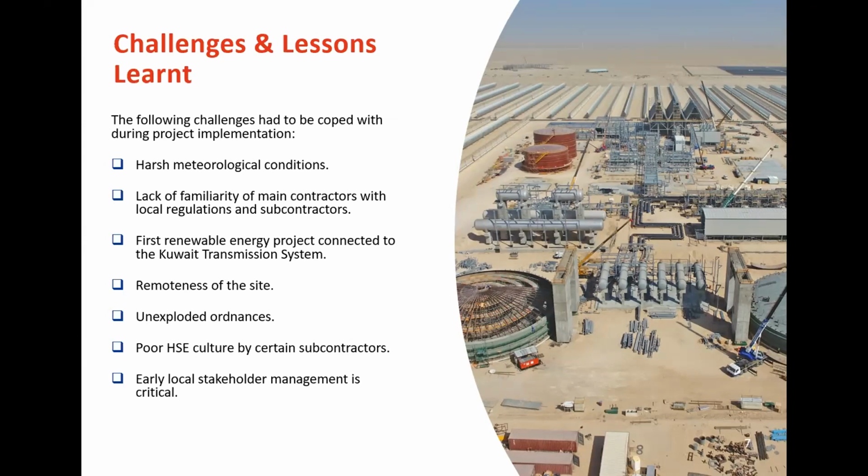Okay, so this was managed by having the army, before the execution of some of the projects, scan and survey the site completely, and also establishing some specific safety protocols during construction to make sure that, at least for some of the activities like earthworks or piling, the DBO contractors had a clear guideline and plan on what to do in case of finding one, so that the impact would only be in terms of delays, but not in terms of losses or fatalities.